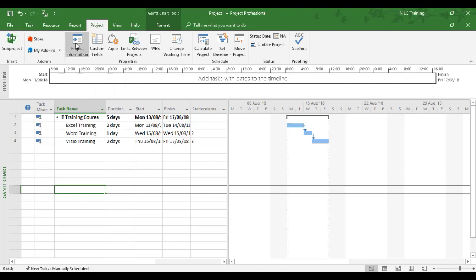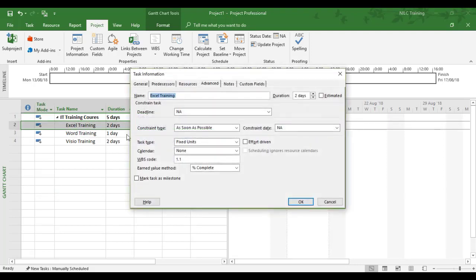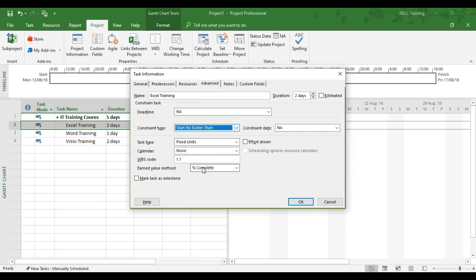When you use auto scheduling, you're picking up on Microsoft Project's automated features like the project information start and finish date. We could also say, in this example, we wanted the Excel training itself to start a bit later. There's been a delay—the trainer wasn't feeling very well. Now I can add what's called a constraint, and we couldn't do this in manual scheduling. I'm going to double-click the Excel training task, go to Advanced, delay its start: start no earlier than, because we don't know exactly when the trainer is coming back.